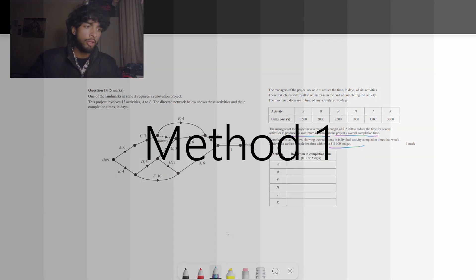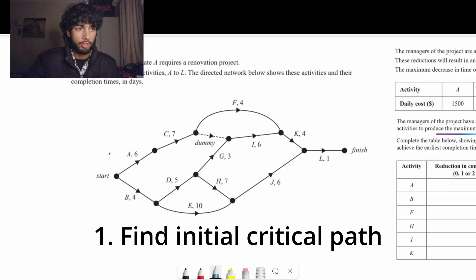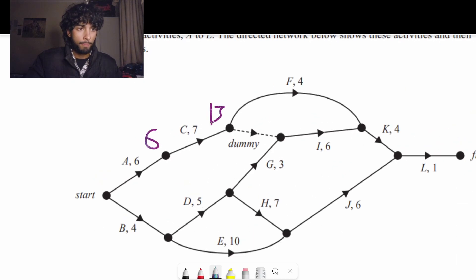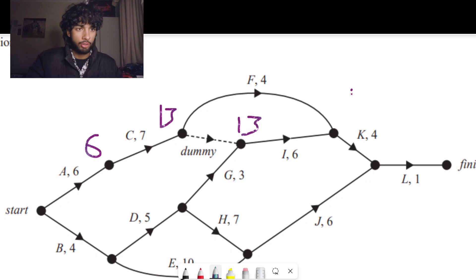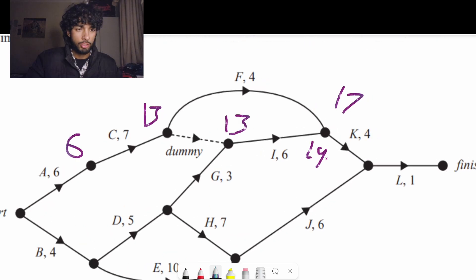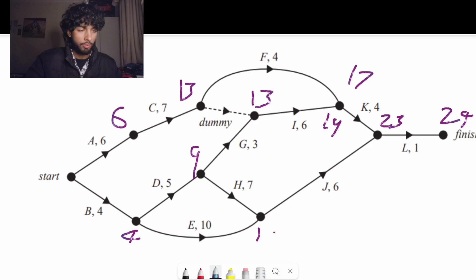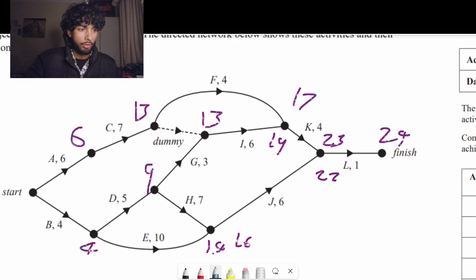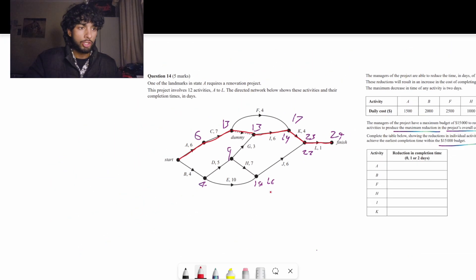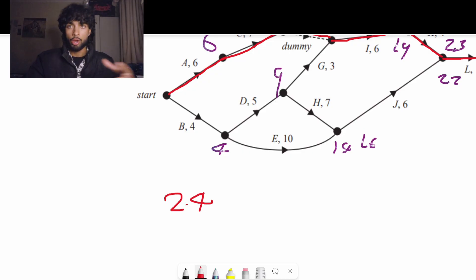They want to have the maximum reduction in the project's overall completion time for that $15,000 budget. Let's go ahead and do method one. So the first step we're going to be doing is finding the critical path. This should be something kind of second nature for you guys. So the critical path looks to go like this here and then using the dummy activity going this way.